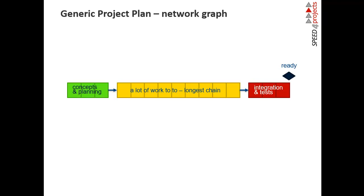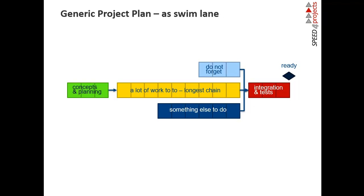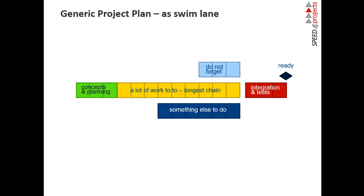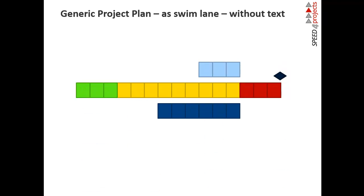Normally projects are not like this alone. There's typically something else to do, but it's not the longest chain, so you can start a little later. And typically in the end you have something you won't forget at all. That's a very generic project plan. To show you the effect with the buffers, we just remove all this stuff in between. So we have a new time, a real time plan. This is the unbuffered view. All the buffers are in the work packages, and you see it's always a third and two-thirds.